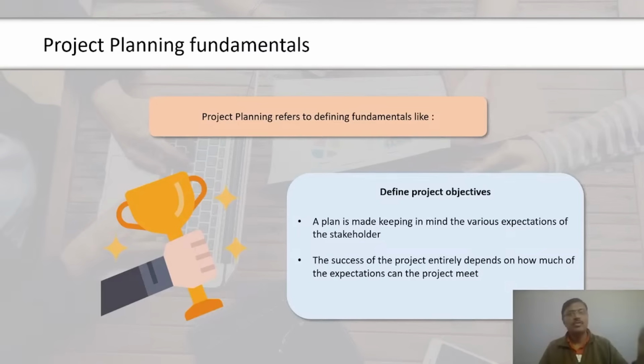The first being the total float, which is the amount of time an activity can be delayed without delaying the project end date or an intermediary milestone. The second type of float is free float, which is the amount of time an activity can be delayed without delaying the early start date of a successor or successors' activities. The last type is independent float, which is the amount of time an activity can be delayed if all the predecessors finish at their latest finish dates and we want to start all the immediate successors at their earliest start dates.